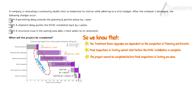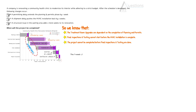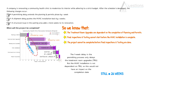So the new completion date should be 28 weeks. Let's review what we just discussed. The one-week delay in the permitting process only delays the treatment room upgrades. But the HVAC installation is not dependent on treatment room upgrades, so this would not have an impact on the completion date — we are still at 26 weeks. When we move to the next item, the two-week delay in the HVAC shipment delays the completion of the entire project by two weeks, because the inspection and testing and project completion are dependent on HVAC. So when you add two weeks to 26 weeks, now you are at 28 weeks.